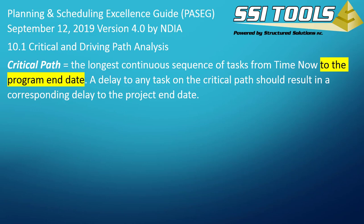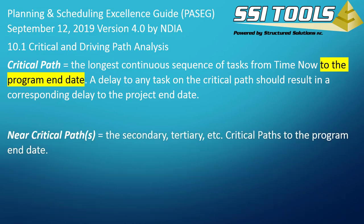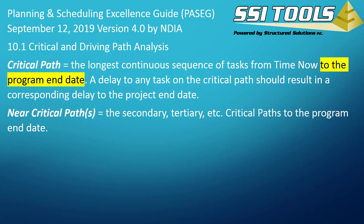Tasks with some schedule flexibility are known as near-critical paths. You may have heard of these as secondary or tertiary critical path. There is no official definition of the parameters defining secondary and tertiary critical paths. You might define tasks that can be delayed by one week as secondary and tasks with two weeks of schedule flexibility as tertiary.